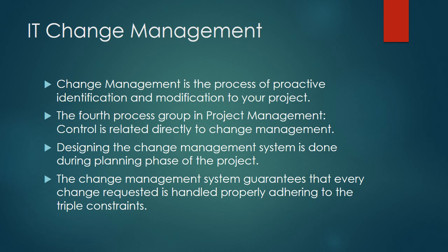Changes are inevitable and they can occur in any phase of the life cycle of the project. We cannot accommodate last minute modifications or scope changes or schedule changes like the change of go live date or any cost changes right in between without doing an impact analysis and a thorough testing. So a system is devised called change management, wherein any modification to what is already signed off as a baseline, if it occurs, would be analyzed, approved, managed and tracked.